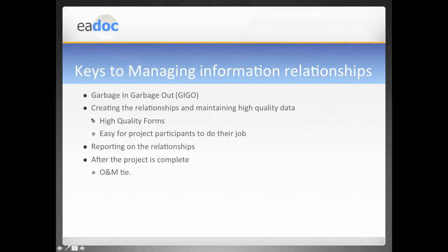A couple of tips here to help you out with those relationships. First is forms. When you're setting up your submittal forms and your RFI forms here in the system, make sure they have mandatory fields on them. This way you can make sure that when the contractor's filling out a submittal form, it links to a spec and a drawing. When a project manager is reviewing a submittal or an RFI and they think there's an issue, they're using the risk tracking log or the risk register to create a link to that particular issue. And you want to make it easy for the project participants to use. If it's too difficult, users are going to take another route. You need to make it the easiest path to the highest quality information.